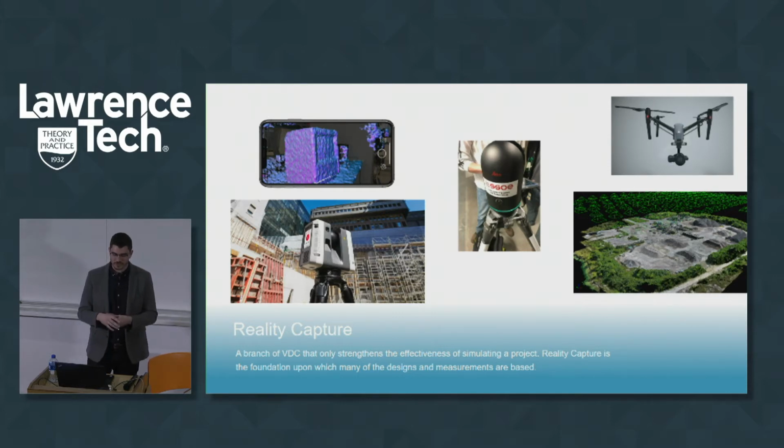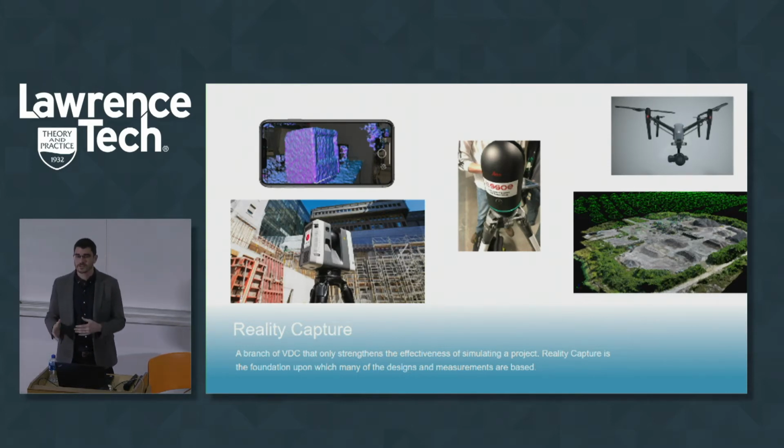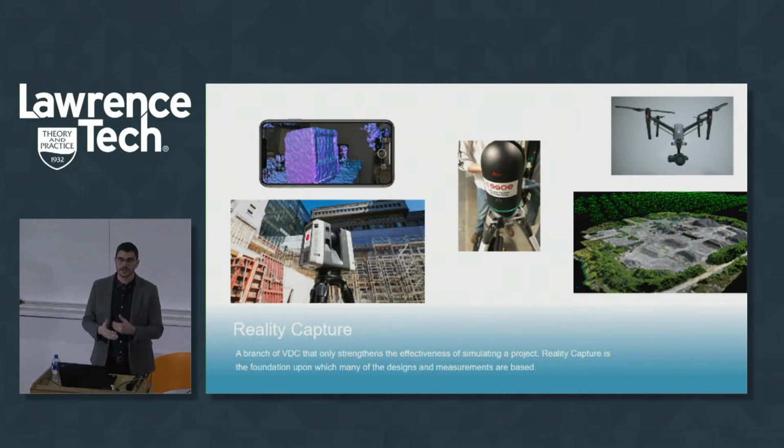At SSOE, we utilize reality capture on almost 80% of projects. At the beginning, usually at the end as well, but we're toying with the idea of utilizing the capture devices during construction to start tracking percentage complete also. So now we get into that time element also with reality capture.